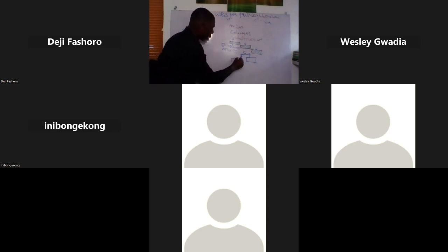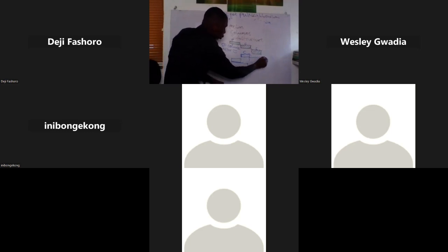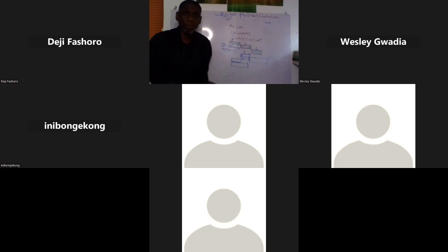He may be wanting substructure to start. Or it's possible that as soon as column starts, you can even have a relationship like this. Because you have seen that the successor activity takes a longer duration, you will not want it to be like this. You may want to just push this. You use this relationship if there is no risk of the successor starting when the predecessor is still on.